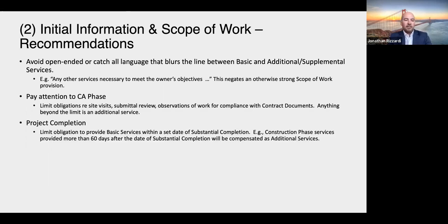Relatedly, well, somewhat relatedly, same kind of idea, project completion. You've got to set an end date at which point you're no longer in basic services, you're in additional services. So if they're calling you a year from now to look at something, that's an additional service.